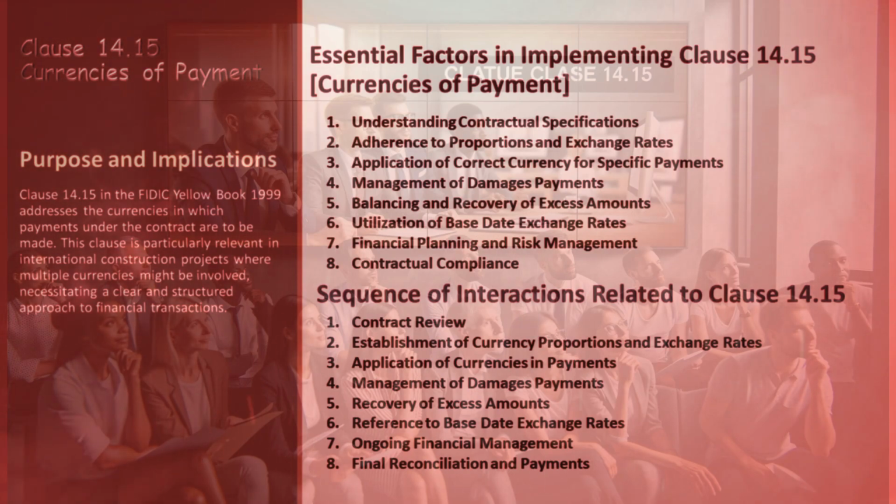Manage damages payments meticulously, ensuring they are executed in the currencies and proportions detailed in the appendix to tender. Be adept at managing scenarios where the contractor owes more in a particular currency than what is due from the employer, enabling a balanced recovery from payments in other currencies.